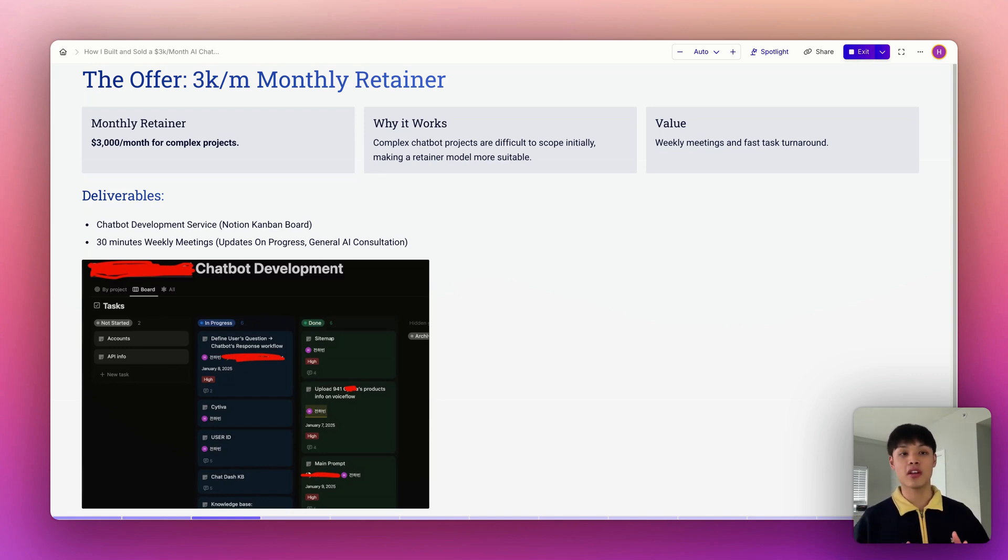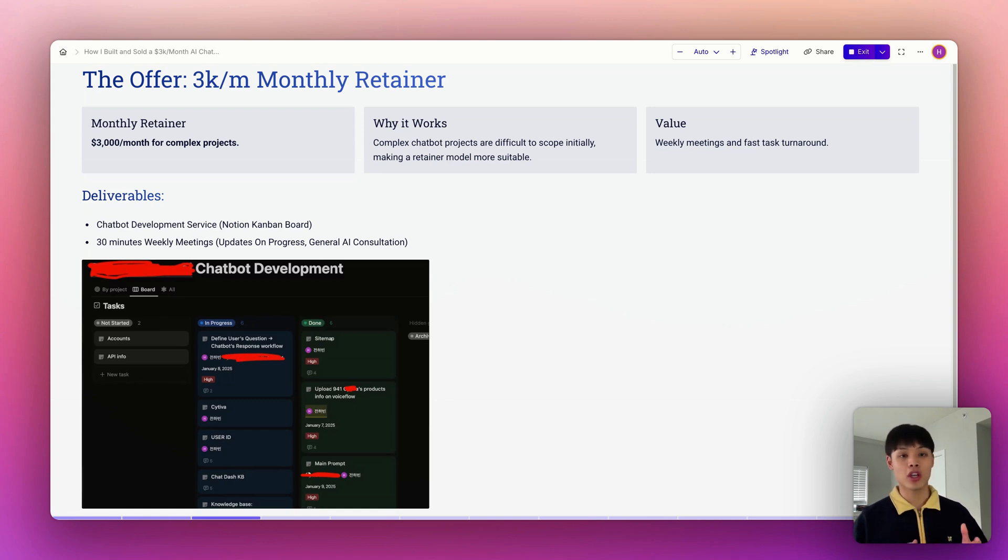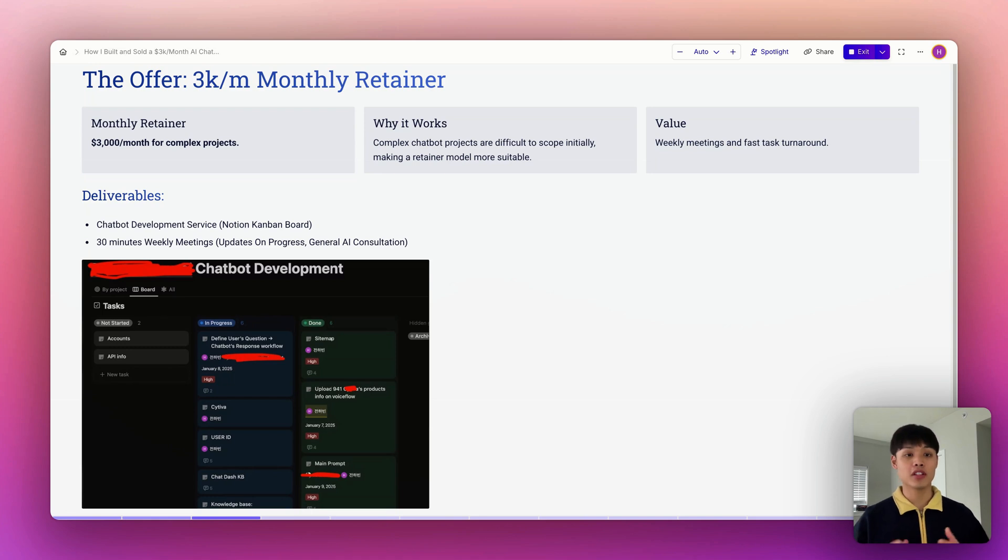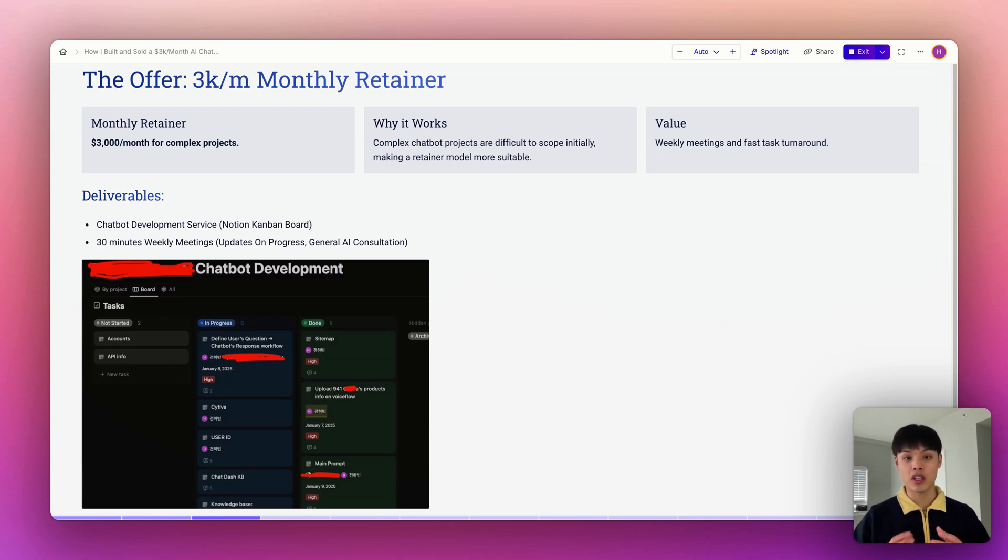Here's what the client gets: a Notion Kanban board where they can track every task, update, and priority in real time. And secondly, weekly 30-minute meetings to review progress, make adjustments, and provide AI consultation in general.